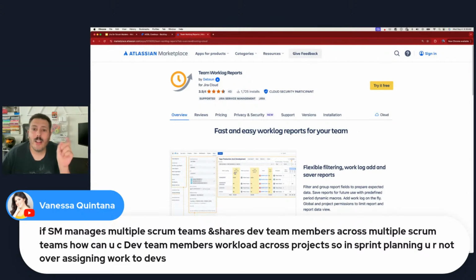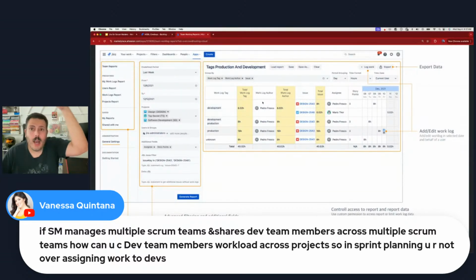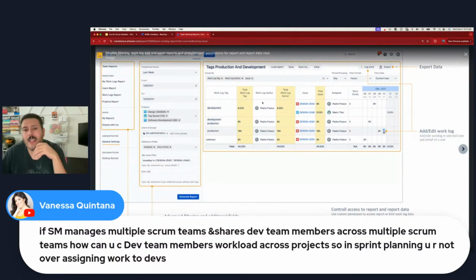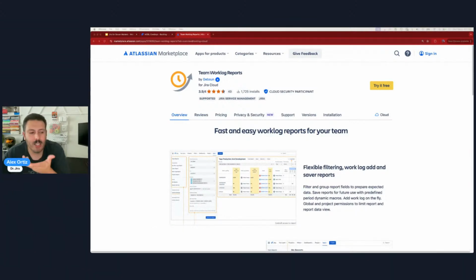And then the other thing that you've got to do is be very religious about switching from story points to time estimates, so that everybody has the right time estimate. And then in here, because you can put people's names in your search, you can see that person and how many total hours they signed up for across all the different projects. Because again, you won't have a singular view here in Jira. It's just not designed for that.